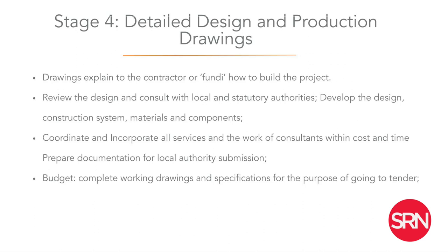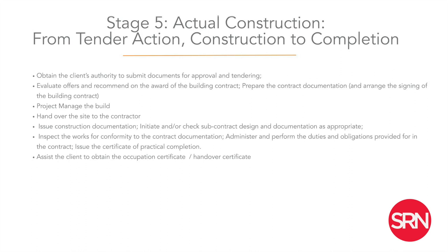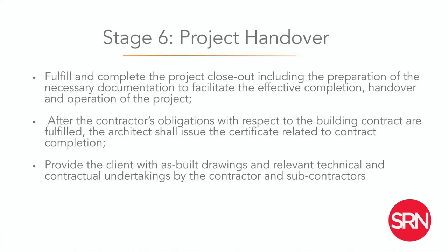Stage five covers tender action through to construction and completion. The architect obtains authority from the client to submit documents for tendering, evaluates contractor offers, and recommends award of the contract. All documentation required to enable the contractor to build is arranged at this stage. The architect then hands over the site to the contractor and supervises it, acting as project manager for day-to-day site activities. Finally, when the building is complete, it is handed over to the client with all necessary documentation to facilitate proper use of the building.